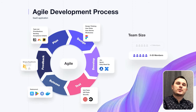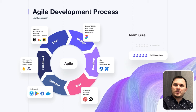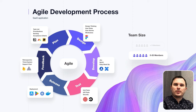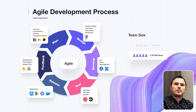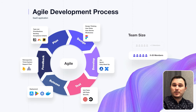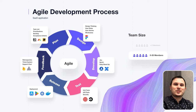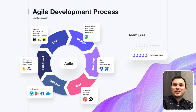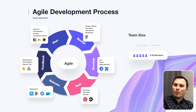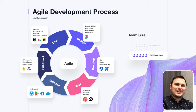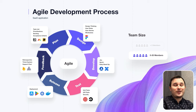To avoid these problems, hire a tech lead to oversee the team and code architecture. Find a project manager with a tech background. Implement scrum, sprints, backlog, and retrospective processes. Conduct daily stand-ups to keep everyone updated on pending tasks. Utilize advanced tools like Jira to manage tasks and track your team's velocity. Choosing the right tools at the appropriate stage can accelerate your progress toward achieving your MVP. However, even the best tools can lead to failure without the necessary knowledge or expertise.